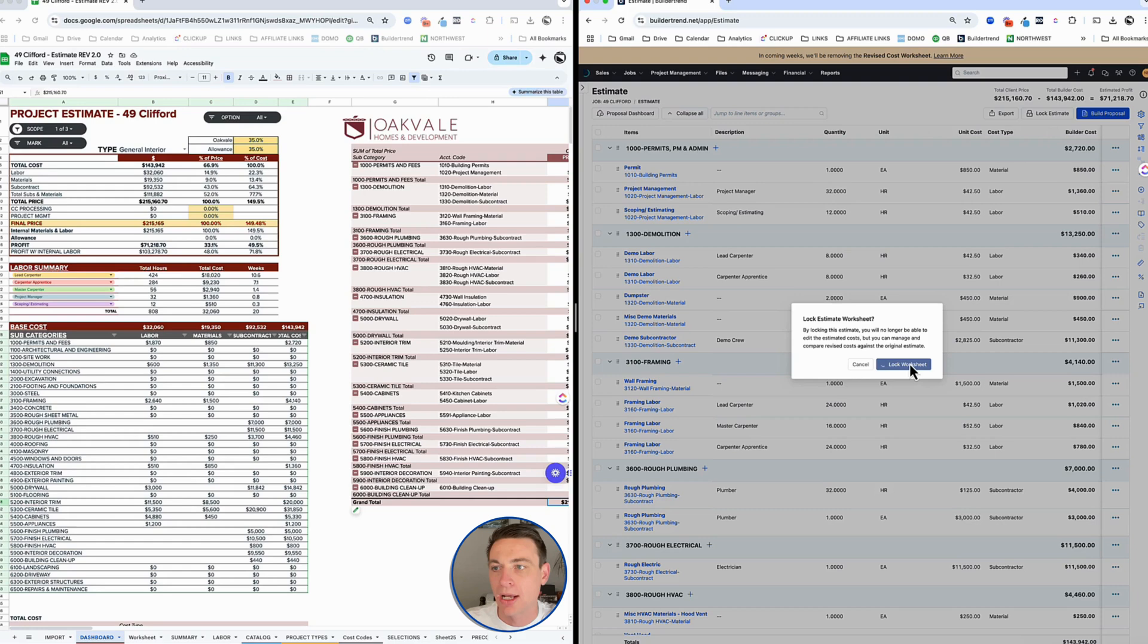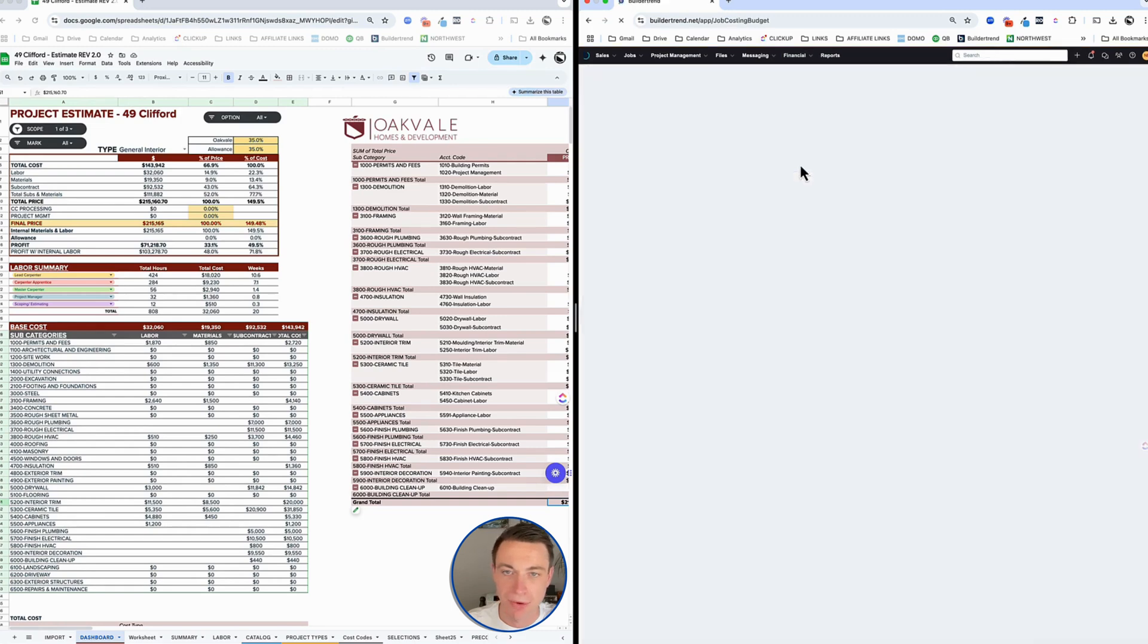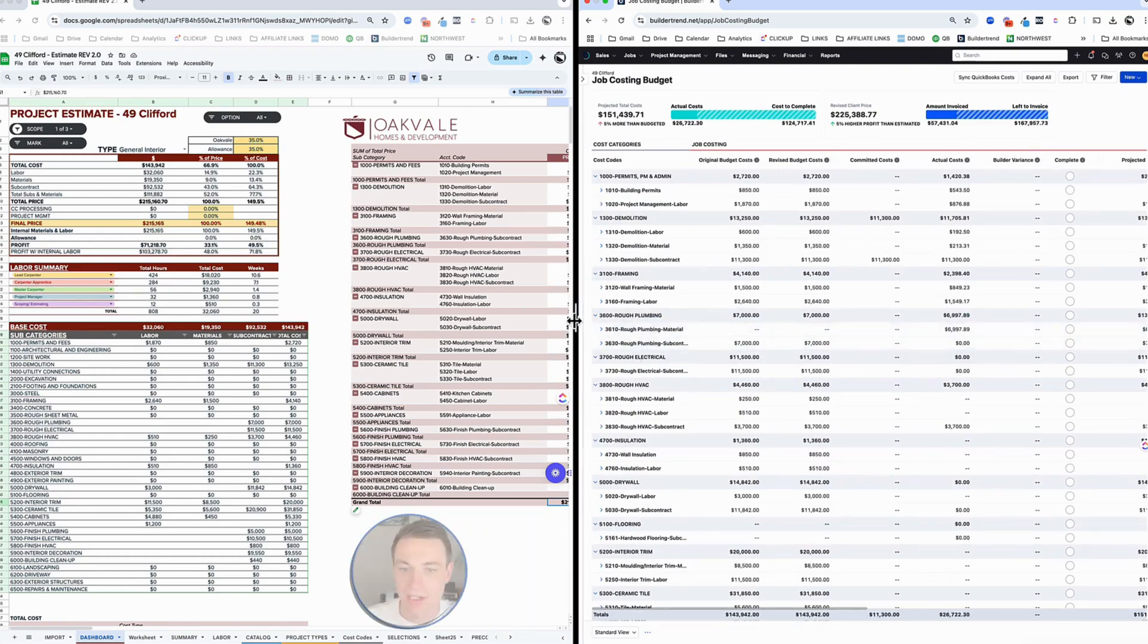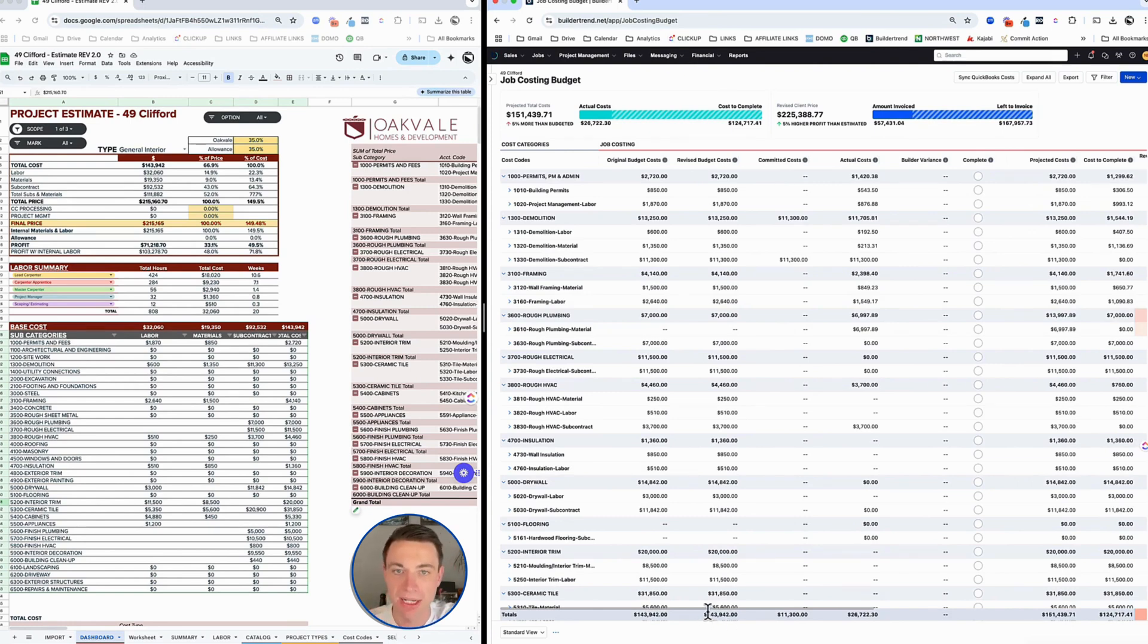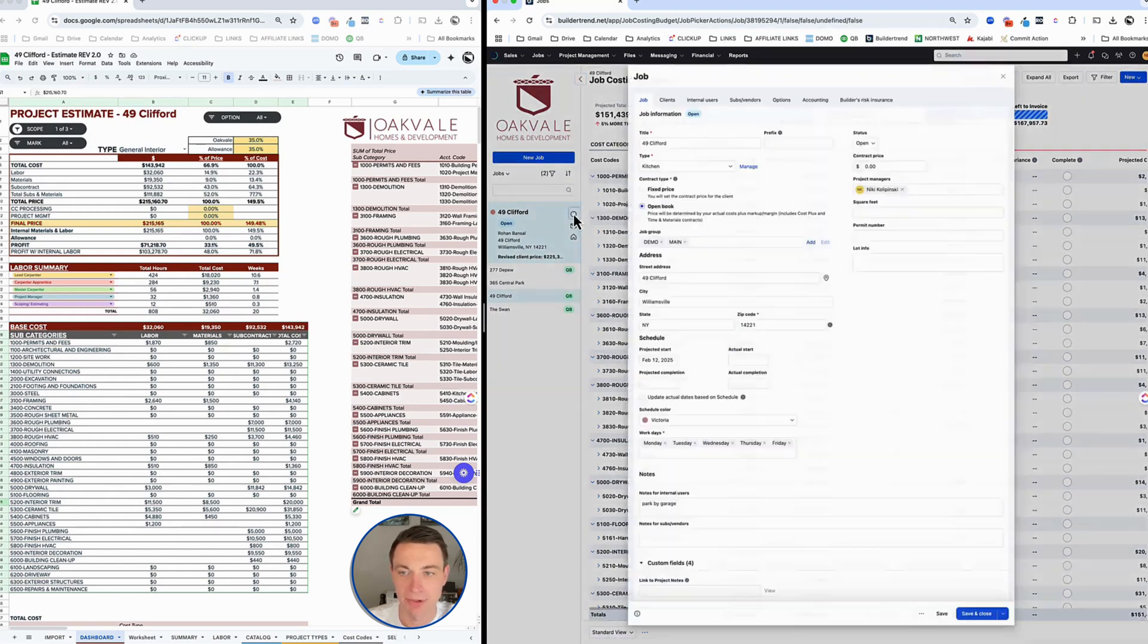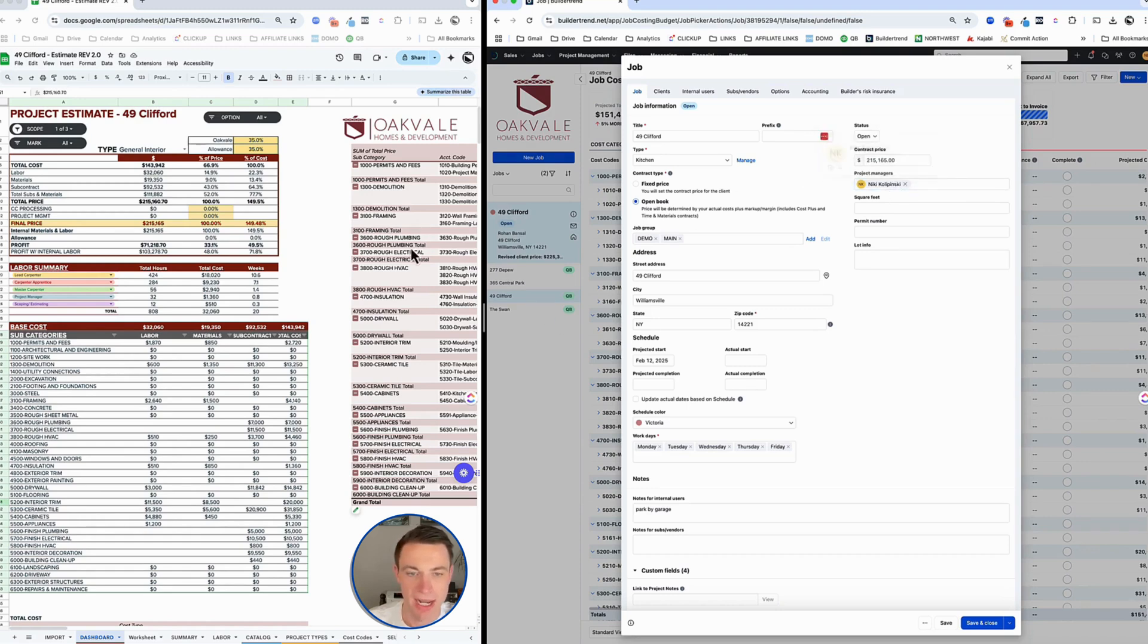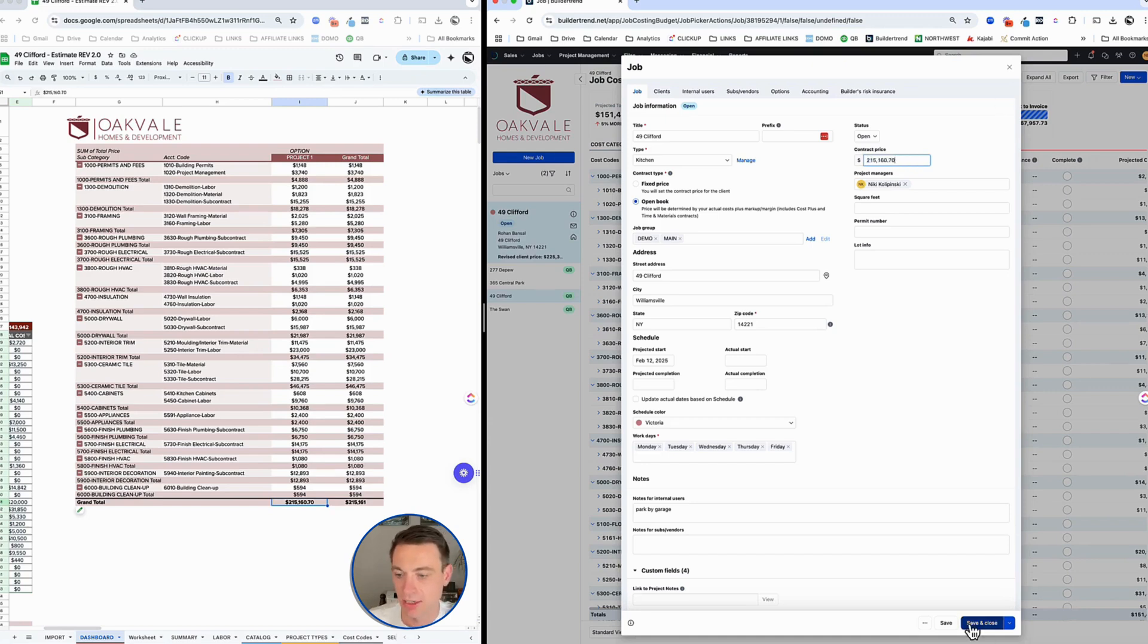BuilderTrend now has the authority to track revised price. So if I go to my job costing budget, what we'll see now is my estimate, my original estimate, and we can start tracking the revised cost. Right now, nothing's changed. But as I start to make adjustments, as you've seen in my job costing videos, that will get updated. The other thing I have to do is update my contract price. Even though this is going to be open book, I still want that total $215,165 to show up there so that I can track against the original. And actually I'll just put it in exactly, which is $215,160.70.